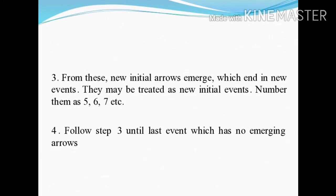They may be treated as new initial events. The third step is that from these new initial events, arrows emerge which end in new events. They may be treated as new initial events and numbered 5, 6, 7, etc. Follow step 3 until the last event, which has no emerging arrows.